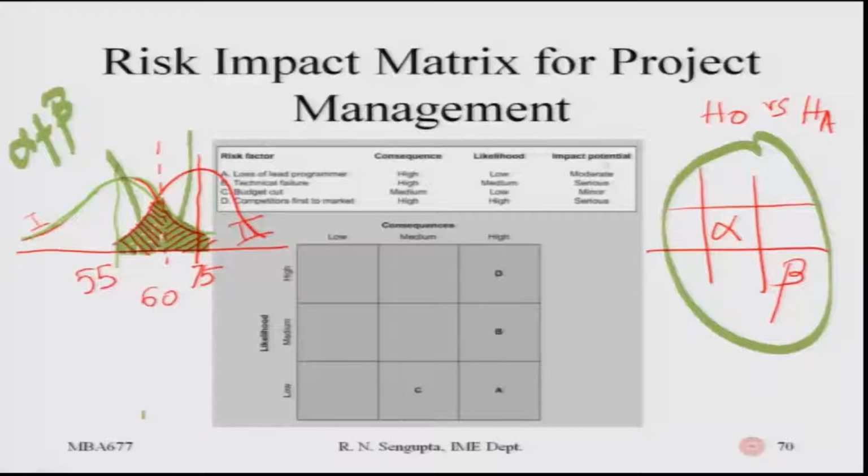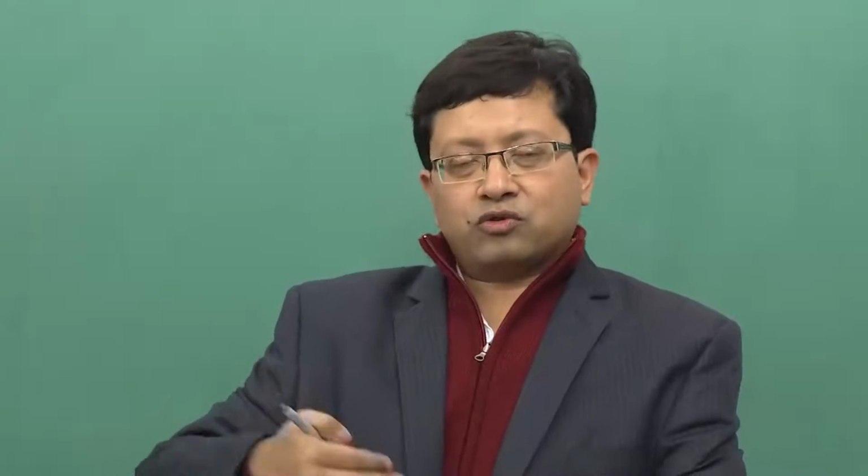So, these impact potential, likelihood potential and the consequences which you see here in both the matrix as well as in the top table would be high and low depending on how you have been able to quantify the overall risk. If you want to be much more stringent, you will try to make more categories of high, very high, low, very low risk, and the consequence would also be mapped correspondingly in order to understand the picture in a better light.